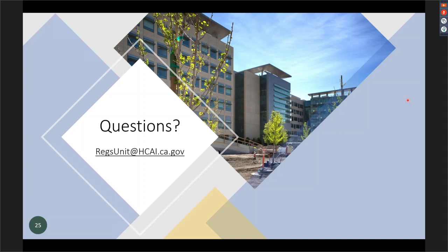The DPOR only signs the drawings. The form, it can be the design professional of record should be the one stamping and signing that. But if it's a structural change and the structural engineer signs it and stamps and signs the form, as long as they're assigned to the project, there should be no argument about who's actually signing it.